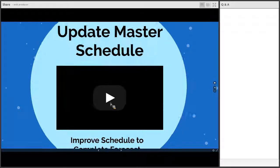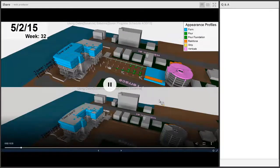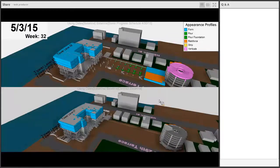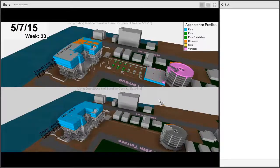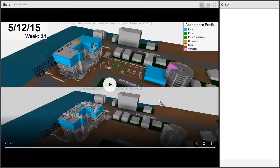So the discussion about needing to work overtime in order to catch up to the schedule because one element of work was not done was a short conversation. When you looked at the overall picture, that was even for a novice of knowledge of this project to understand, that clearly this progressed actual project schedule on the top half compared to the baseline on the bottom half, the contractor was ahead of schedule. So that kind of ended the discussion about having to work overtime or adding more people to get an element of the work on time. Critical path was fine. That can be really done comparing any two schedules to each other.